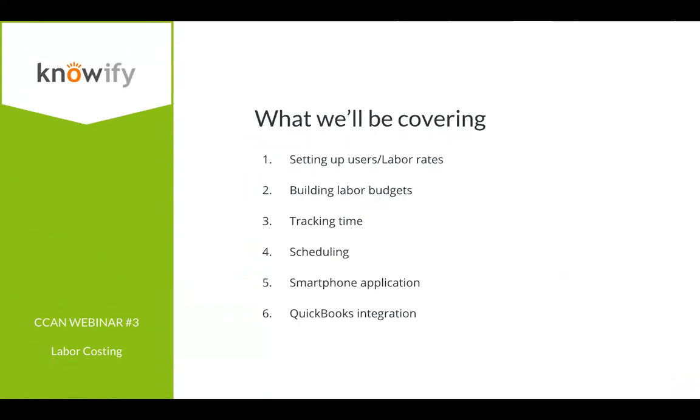Next, we'll be getting into the budgeting side of labor, how to set up your hourly costs when you're estimating the cost of the job, and then how to track all of your actual costs logged by your employees versus what you set up as your budget when setting up the project. Obviously, through this, we'll be discussing tracking time. That's where the labor costing really happens in Knowify. As the hours are logged in the system, we take that times the hourly rate, and that's where we're showing your labor cost in real time.